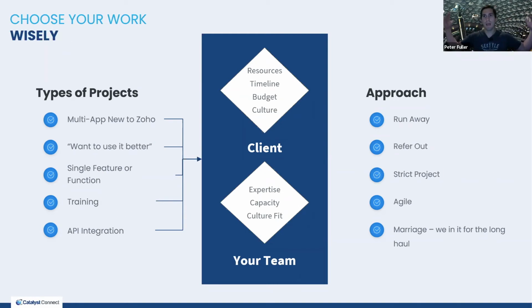There are so many apps that can be brought to bear, and the apps can fit almost every nook and cranny of a business, that you need to take a paid portion at the outset to really outline what you are going to be creating in the end, and what is going to be the focus.